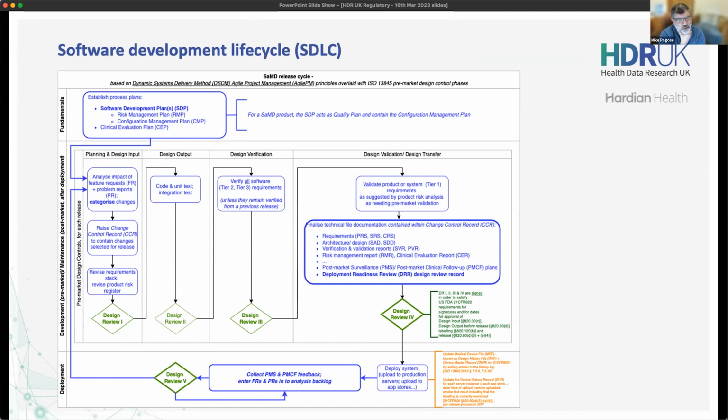So one of the things we try and do as well, again, going back and rounding off the software as a medical device into the overall ISO 13485 and American equivalent design control. And this goes back to why we plan release by release. We say things are iterative, and plan release by release is what ISO 13485 says: to release a product, you need to go through a sequence of phases, which are called planning and design input, design output, design verification, design validation, design transfer. So again, the question was asked earlier, what's the concept of design transfers?